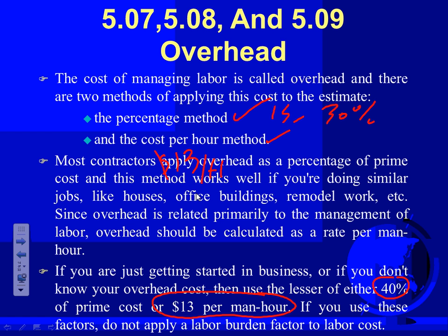I have been told by a smarter guy than me, Derek, if you want to make money, you need to make a dollar. So if you are working for me and I want to make money on you, if you charge me $1 as an employee, you have to make $2: one to pay me and my company and one for yourself. So basically, whatever it costs you, you double it to make money and pay everything else. That's a rule of thumb, guys.